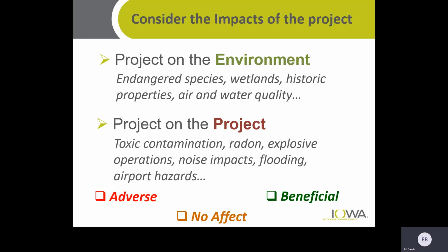When you consider the impacts of the project, you need to look at a wide variety of items. Endangered species, wetlands, historic properties, air and water quality, toxic contamination, radon, explosive operation, noise, airport hazards. Those are all, of course, man-made type of situations that affect the environment, and of course flooding. And you make a determination, depending on your level of review, of adverse effect, no effect, or in some aspects, projects can of course be beneficial to the environment.